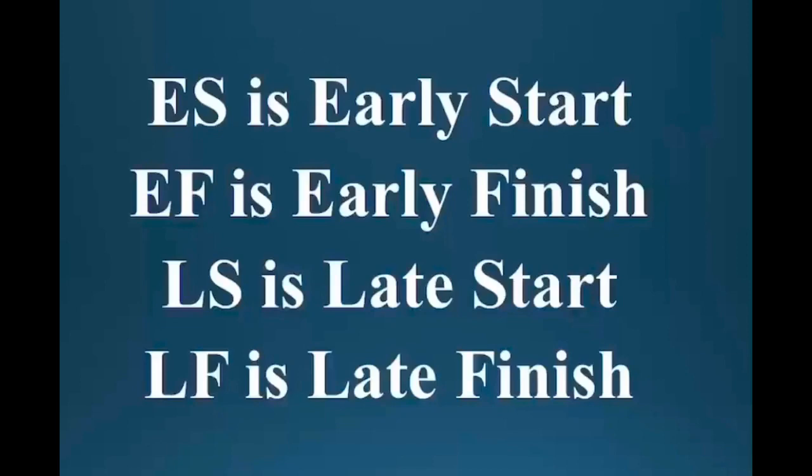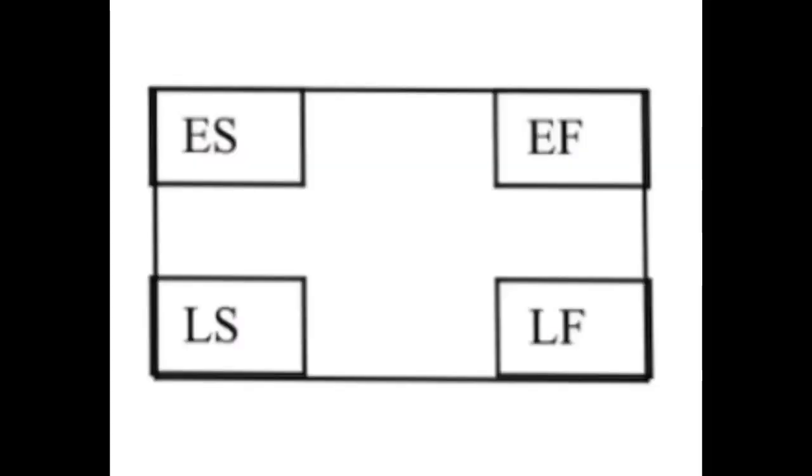So we get our early start, which is our top left. We have our early finish, which is our top right. We have our late start, which is our bottom left. And we have our late finish, which is our bottom right.